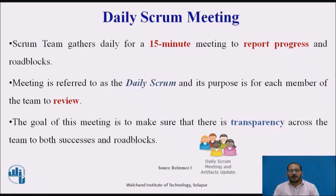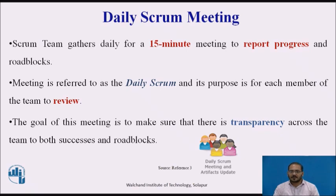During the course of the sprint, the sprint team gathers daily for a 15-minute meeting to report progress and roadblocks. This meeting is referred to as the daily Scrum. Its purpose is for each member of the team to review what was accomplished towards the sprint goal since the last meeting, what is to be accomplished by the next meeting, and to identify any obstacles. The goal is to ensure transparency across the team regarding both successes and roadblocks. The daily Scrum is not intended to solve issues during the meeting but to expose them to the entire team and schedule time to work on them.